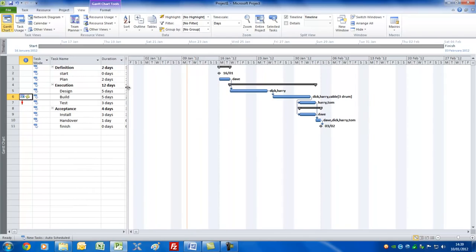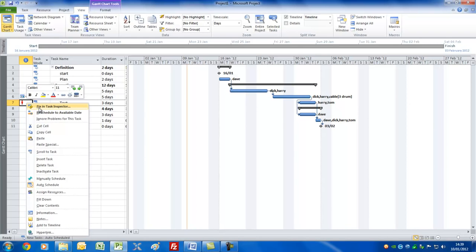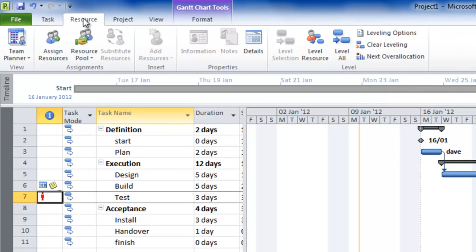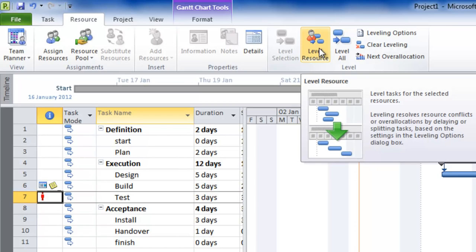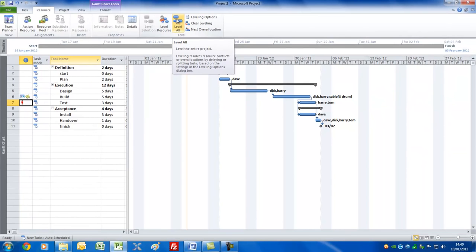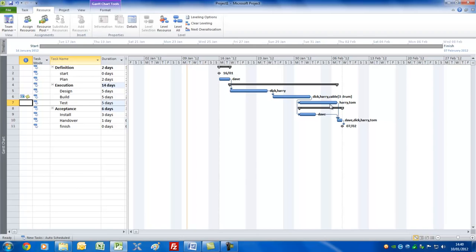The next thing we need to look at is whether we've got any problems with resources. Clearly there's one here — the Test task has a little red figure showing that it has some resources with problems. You can fix it in the Task Inspector view, or you could get Microsoft Project to reschedule the task to a later date. However, I'd like to show you the traditional way. On the Resource tab you've got the Level Resource command — I'm going to press Level All to fix it in one fell swoop. Project will try to fix the problems by delaying or splitting tasks. Sure enough, it's increased the duration of some tasks to fix the over-allocation, and we now have no resource problems.